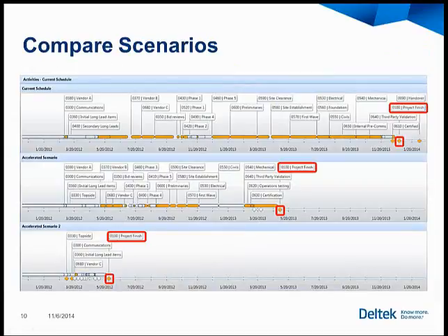From that point, you're generating scenarios. Are you generating one scenario? No. You might generate a dozen different scenarios where the system has gone in the allowable areas of the schedule to dissect, and it's come up with different strategies. And here I have different strategies that come out to different dates, but they involve compromise, optimization, and acceleration in different areas of the plan.